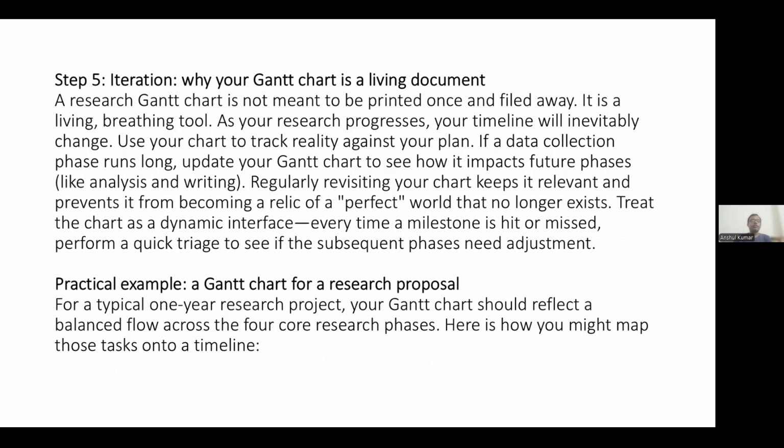If a data collection phase runs long, update our Gantt chart to see how it impacts future phases like analysis and writing. Regularly revisiting the chart keeps it relevant and prevents it from becoming a relic of a perfect world that no longer exists. Treat the chart as a dynamic interface. Every time a milestone is hit or missed, perform a quick triage to see if the subsequent phases need adjustment.